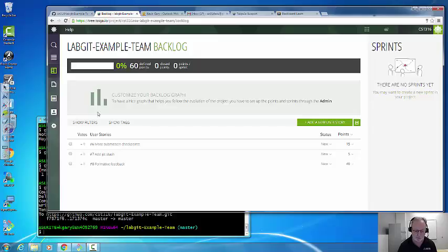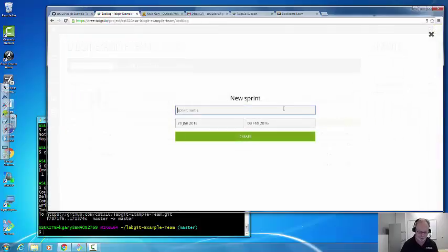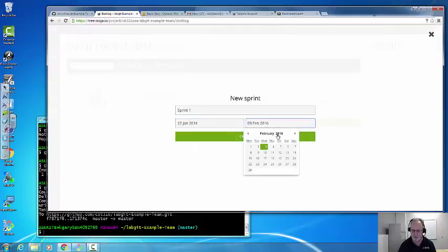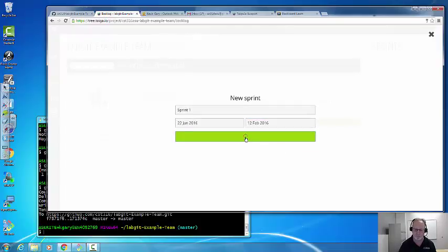I'm going to take the highest story points of the top 2, and I'm going to drag them. Whoops, I can't drag them yet. I don't have a sprint. So the first thing I need to do is to define a sprint. Create a sprint. Sprint name, I want you to name yours by number. So this is sprint 1. Let's say I'm going to start it this Friday, and I'm going to make it go for 3 weeks till February 12th, and I'll create my sprint.